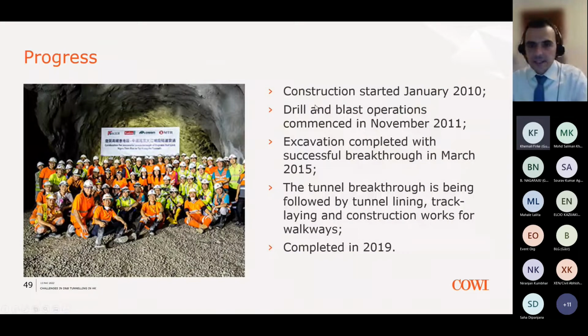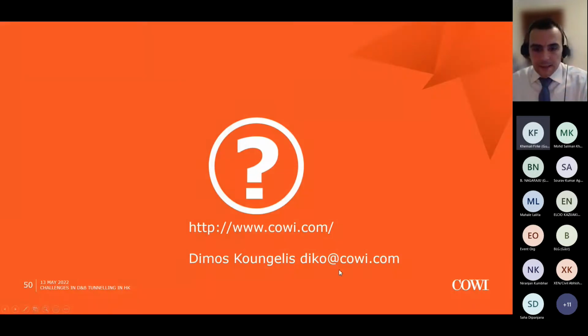And the last slide, just to give you a timeline of this project. So construction at ground surface started in 2010. The drill and blast operation started end of 2011, start of 2012. There was a breakthrough in 2015. And then the tunnel with all the finishes was completed in 2019 and has been open to the public since then. Right, I would like to thank you for your attention, and I'm happy to take any questions.